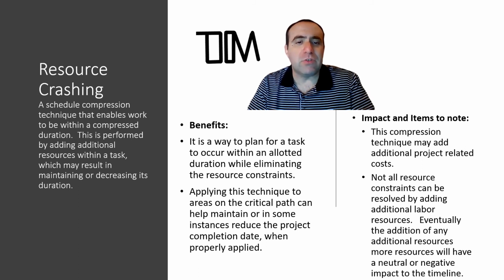Not all resource constraints can be resolved by adding additional labor resources. Eventually, there becomes a point where adding more resources will have a negative or neutral impact on the timeline.